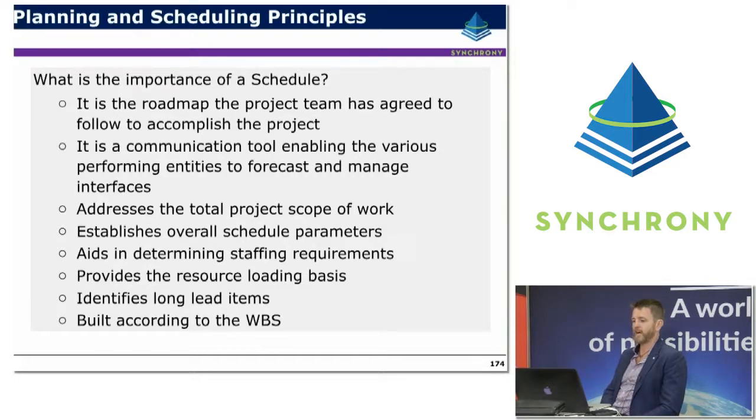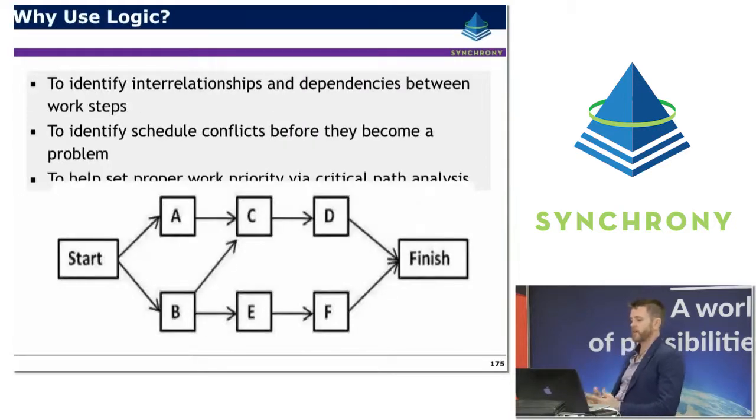It aids in determining staff requirements, providing the resource loading basis, helps identification of long lead items, and it can be built and structured according to the WBS. So some of the different people from different functions can still understand the schedule very clearly because it'll be structured in accordance with the WBS, which should be the same language estimators, cost controllers, contract administrators, project managers are familiar with. So back to that original question about schedule logic, or why use logic-driven schedules.